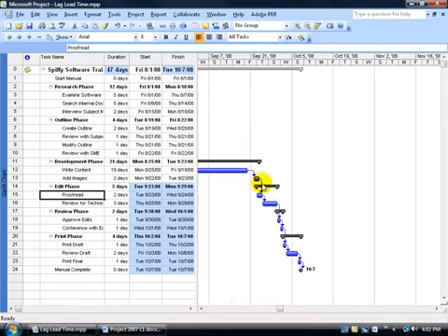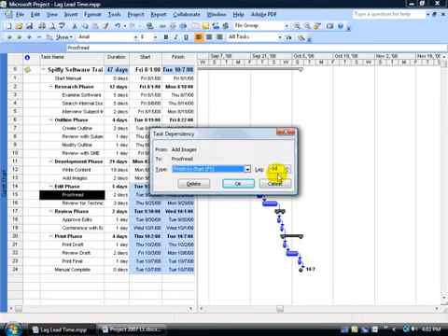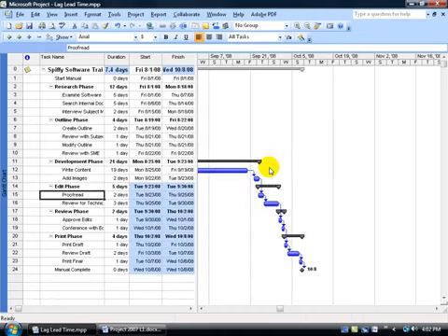I'm going to go ahead and double click on this little line here, and I can make the change here. Instead of -1 day, how about if we do -30% and hit enter. What that means is that the successor would start after its predecessor has finished 70% of the task. So its predecessor has to go through 70% of 2 days. And remember, it's by hours there, so 2 days equals 16 hours. After it completes 70%, then it's going to have a lead time start in 30%.